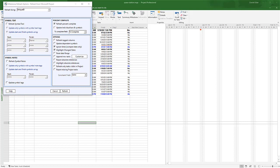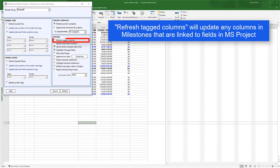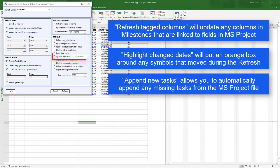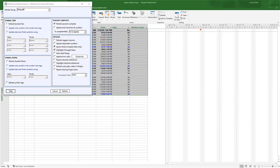There are also some other important additional options listed below. Refresh Tagged Columns will update any columns and milestones that are linked to an MS Project field. Highlight Change Dates will put an orange box around any dates that got updated in the Milestone Schedule. Append New Tasks allows you to add tasks from the project file as you refresh. You can click Customize to see the options related to that. Now I'm going to press the Refresh button.